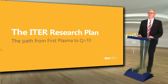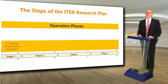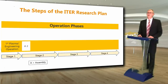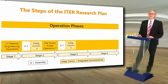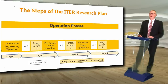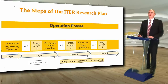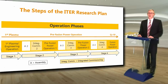Now I'd like to describe in some detail the ITER research plan — the path from first plasma to Q equals 10. The ITER research plan will proceed in four stages, starting with the initial construction and commissioning phase going on now. Then the first plasma and engineering operation phase will be followed by the second assembly and commissioning phase, pre-fusion power operation one, assembly phase three and integrated commissioning three, pre-fusion power operation two, and assembly phase four and integrated commissioning four, before we reach fusion power operation.